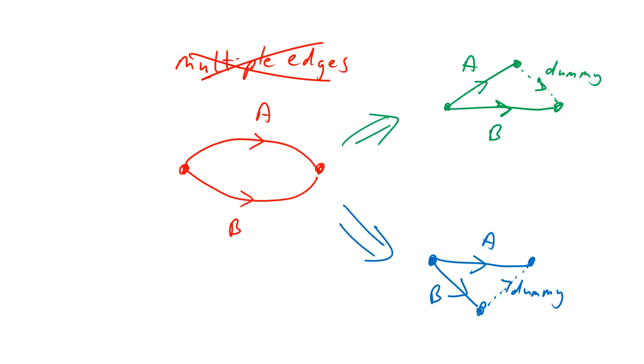Now a dummy has a value of 0, so dummies equal 0. They have no weight, so no weight. All right, so they're kind of just like a special magic way of fixing things, which is not often what you say about dummies, that they magically fix things. You think it's the opposite.